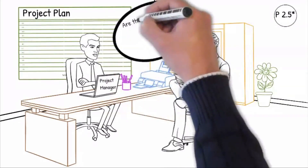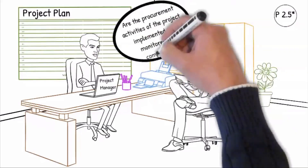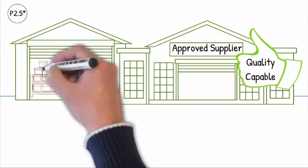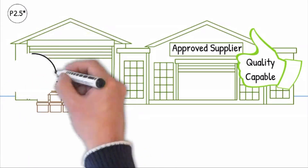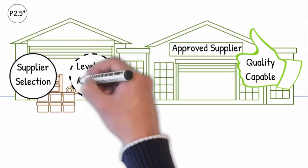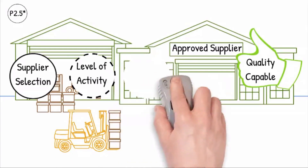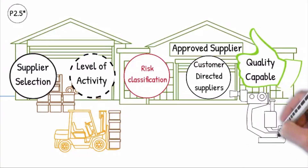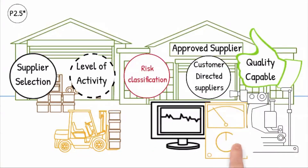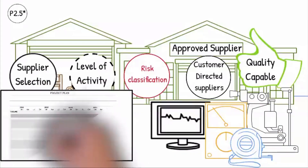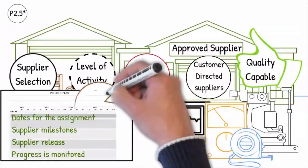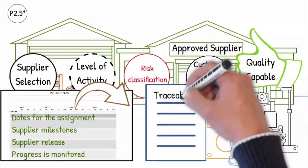Question P2.5: Are the procurement activities of the project implemented and monitored for compliance? The procurement activities ensure that only approved and quality-capable suppliers are used in production. This is included in the Supplier Selection Award criteria for the volumes and delivery target date. The level of activity depends on the risk classification of the procured scope of the suppliers. The activities also include customer-required directed suppliers, and must ensure that only approved and quality-capable suppliers — including equipment suppliers — are used in production. Dates for the assignment, supplier milestones and release have been laid down in the plan and coordinated with the overall schedule, and the progress is monitored. The appointment of suppliers must be traceable through appropriate documentation.